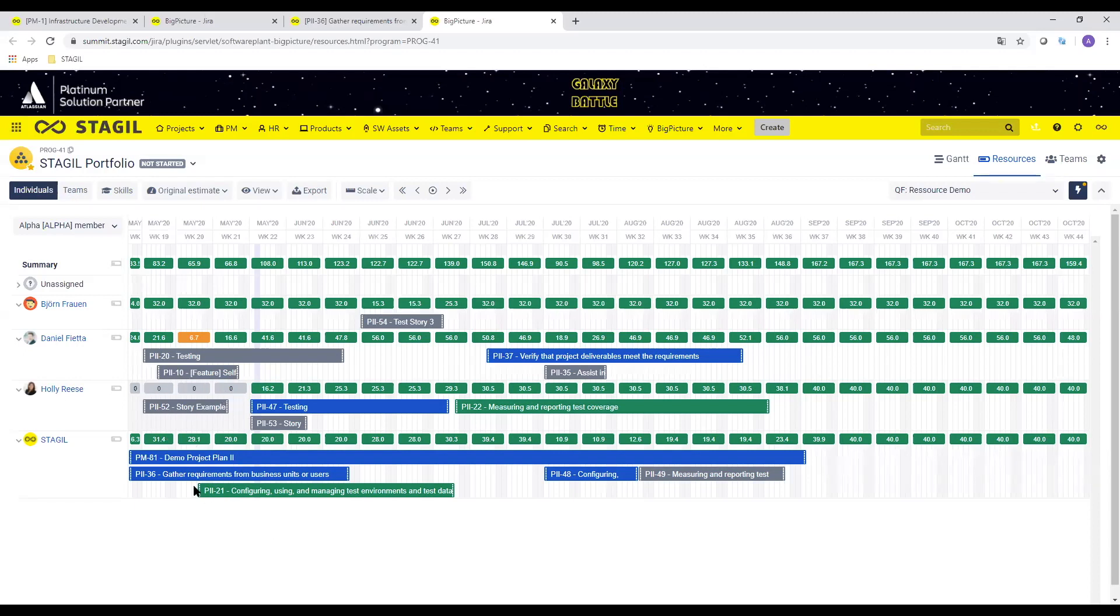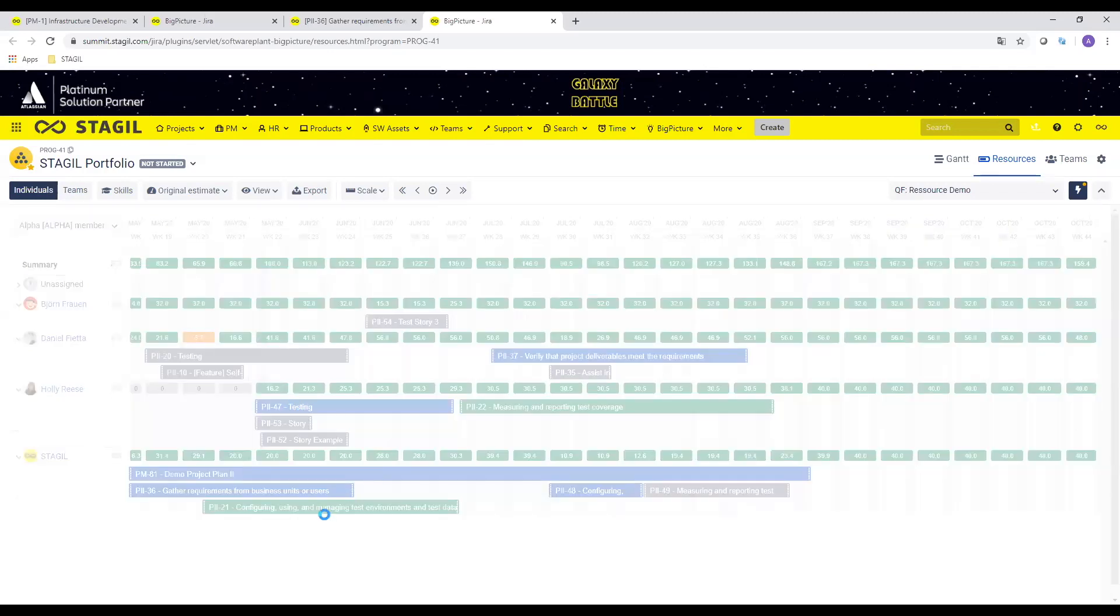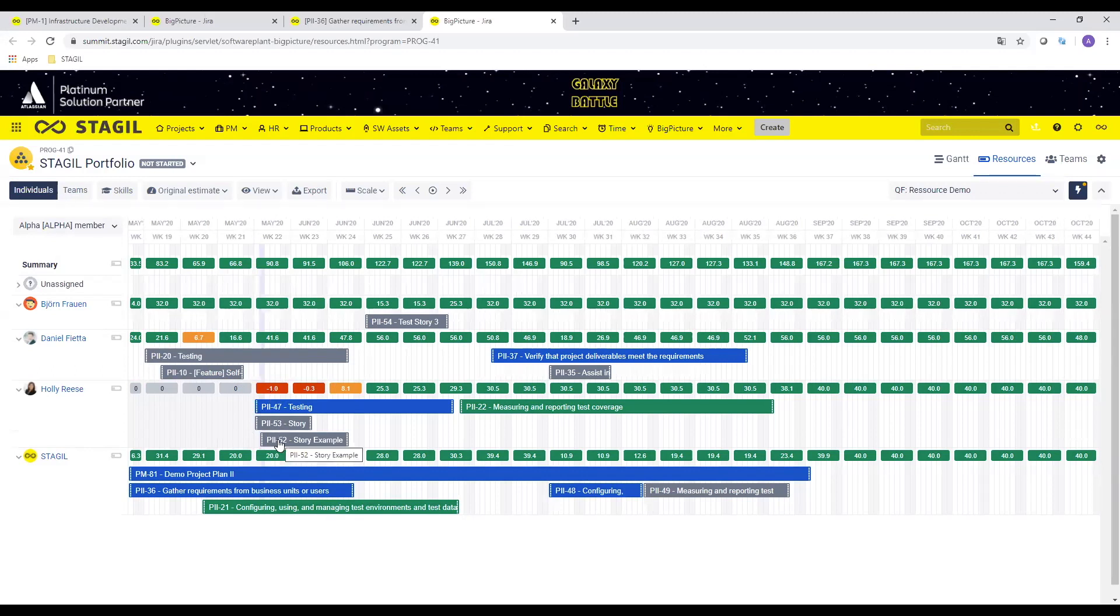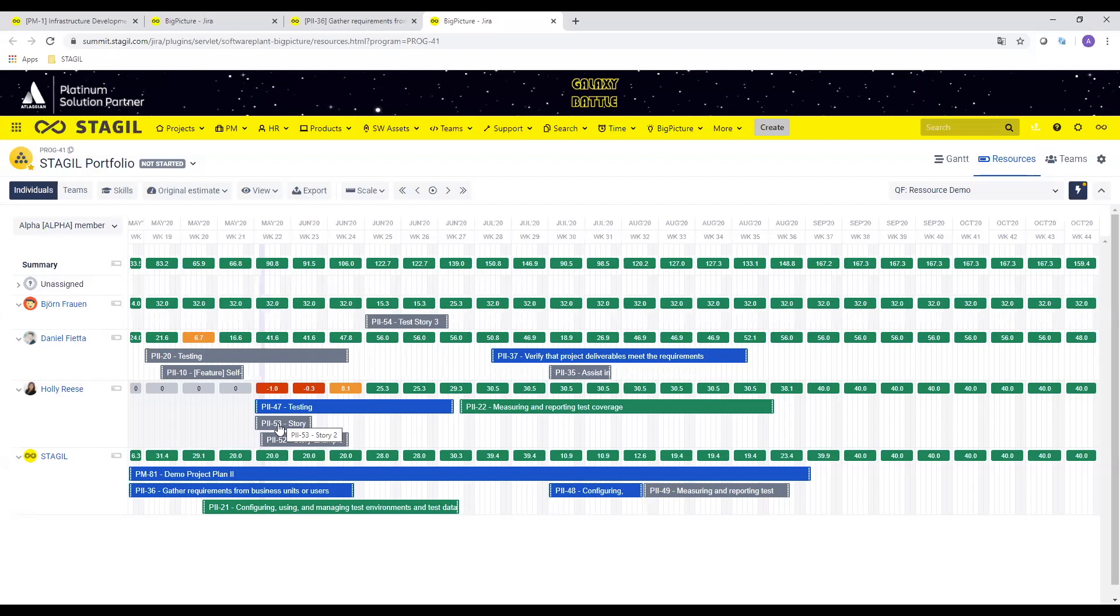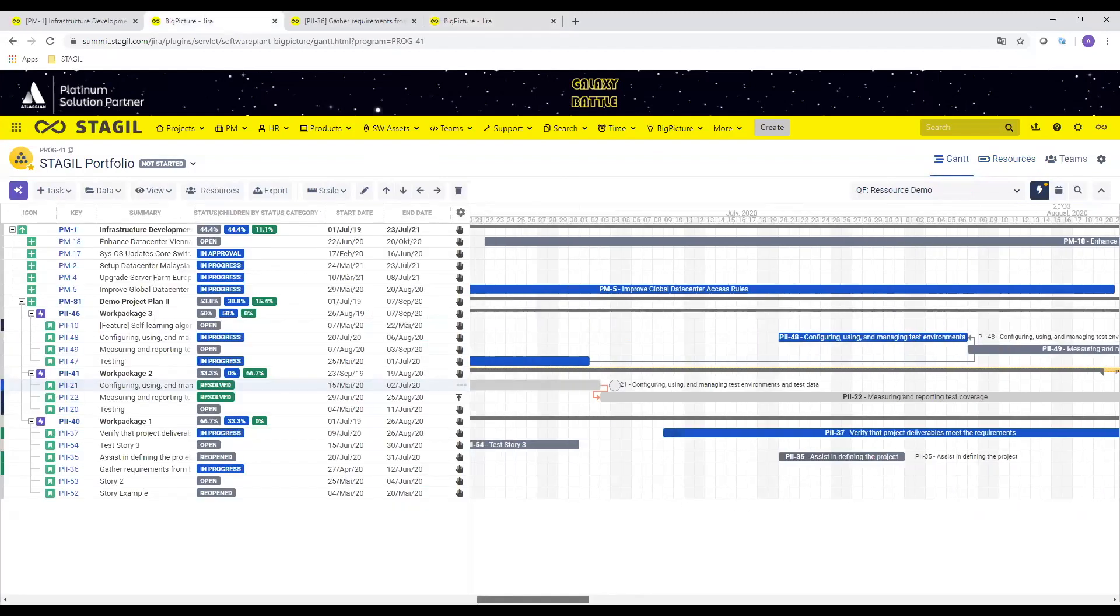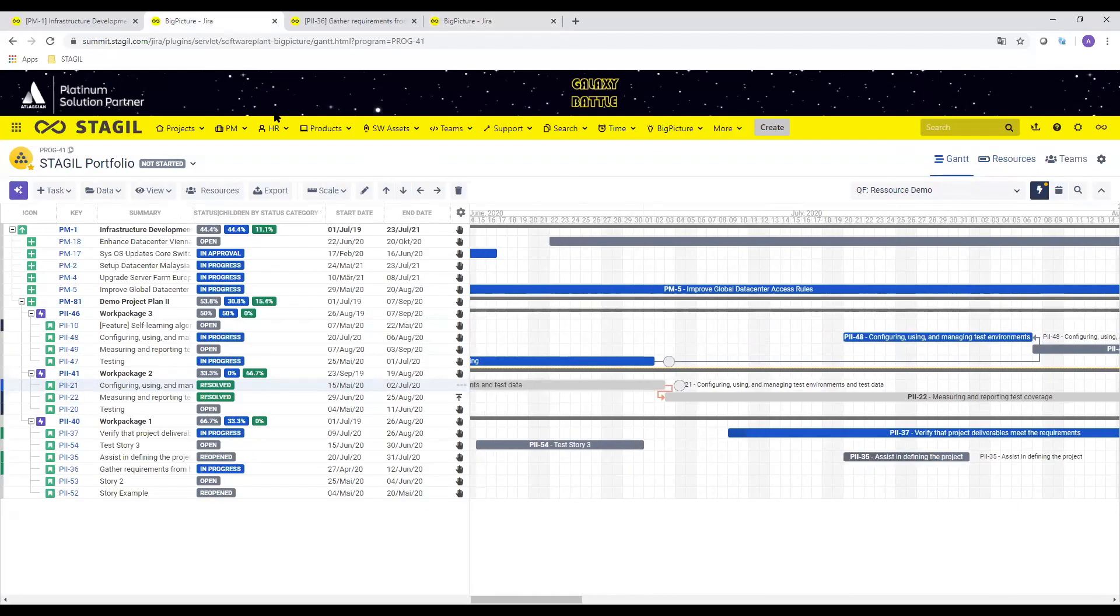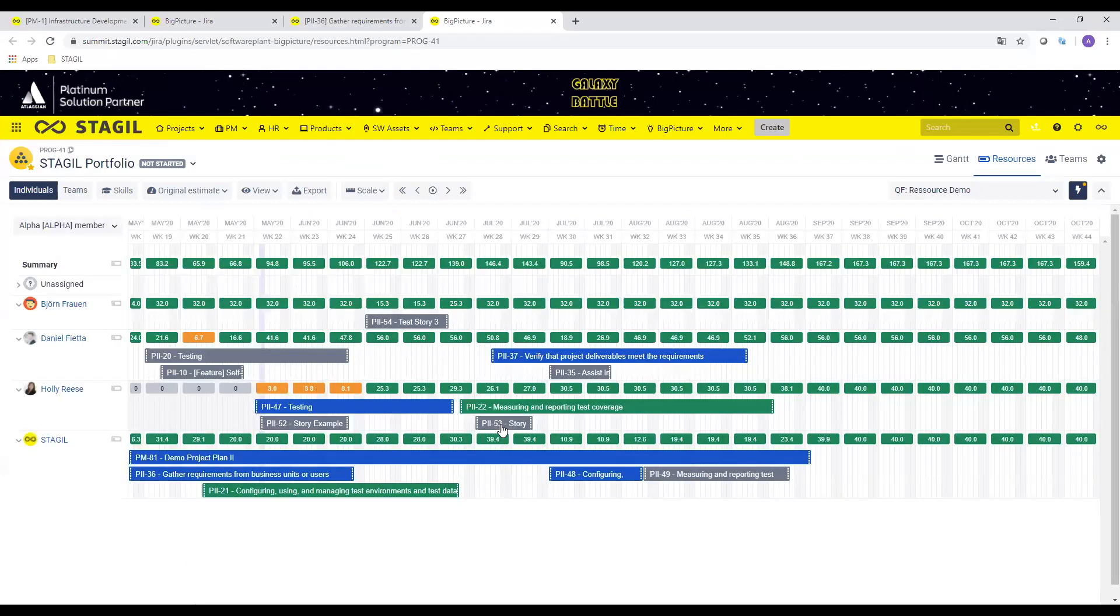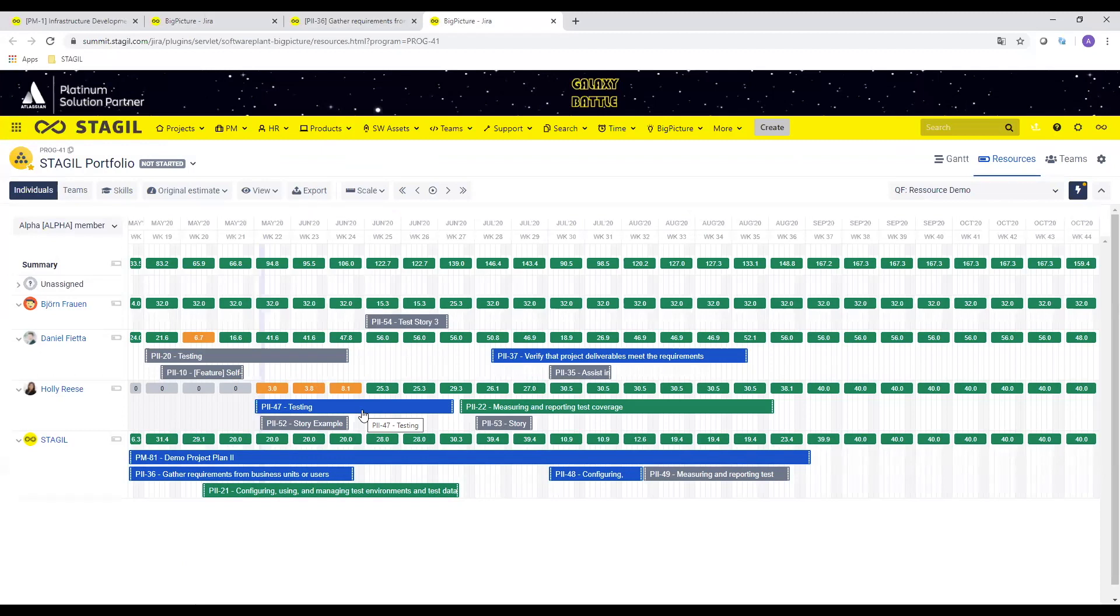So what can I do now? I can plan and I can tell, okay, this Jira task will not be done in this week or in this two weeks. I can drag and drop it here. And this will immediately change her resource because now she's coming back from her sick leave or from her holiday. She's coming back in the office and will see, wait, I have so many issues. I can't do this all in my basic resource. So what is the solution now? I could say, okay, the story 43 in this point is not that important. I can double check it in my Gantt resource management, for example, to see if I have any dependencies or so on. And then I can tell, okay, good. I will plan it three or four weeks later. Then her resources become yellow. So it's not really good, but she will be able to fit all her work with what it was planned. And now everything should be fine.